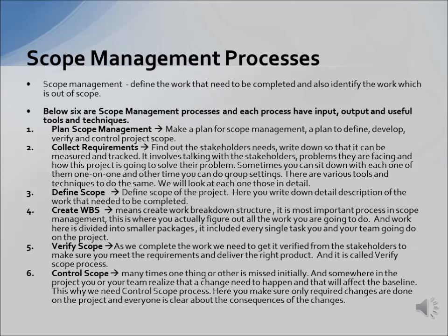Plan scope management is about making a plan for scope management, a plan to define, develop, verify, and control the scope of the project. Collect requirements is about finding out the stakeholders' needs and writing them down so that they can be tracked.